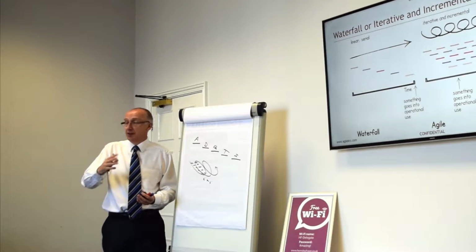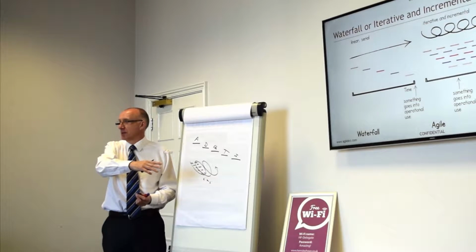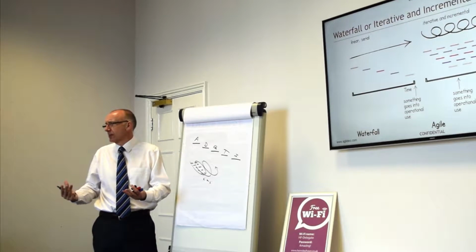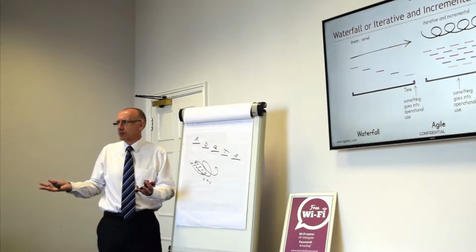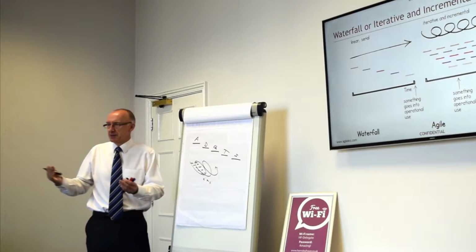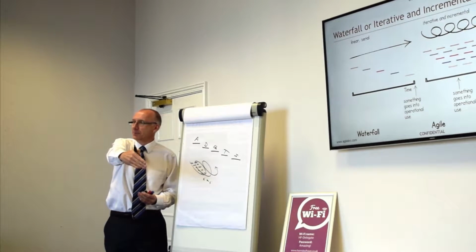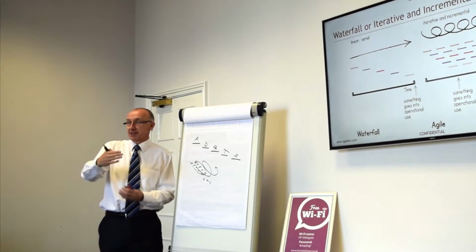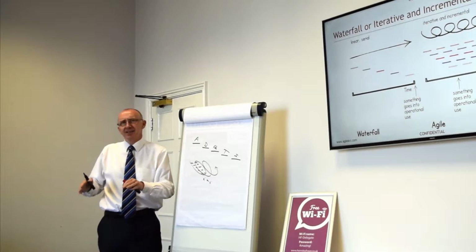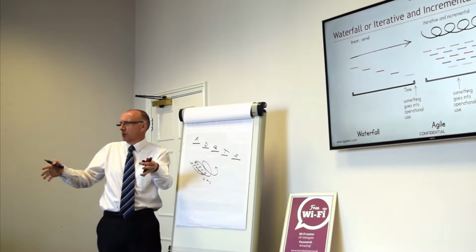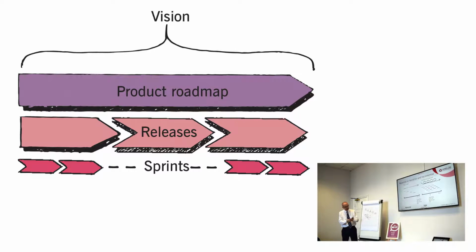Having said that, and I'm not trying to name drop, but I was out in China about 2 months ago and I was saying you wouldn't really build a bridge incrementally. And this hand came up and goes, well, we're building a lot of bridges out here at the moment and that's how we build them. I go, what are you on about? And he was telling me that they build one lane over to get some of the traffic going, then they build the second lane to get more traffic over, and he then started talking about clipping a third and fourth lane on, so they actually can build a bridge. Because one of the points here, and the diagram is showing it up there, is you can get some early delivery of something far sooner than you can with the waterfall approach.